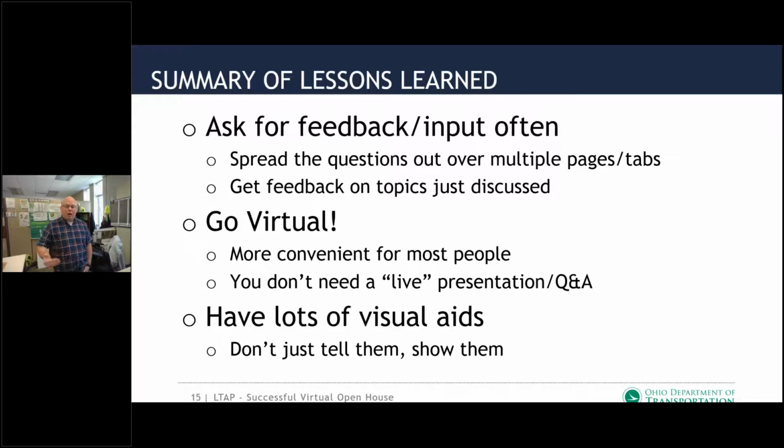With going virtual, you don't have to go live. You don't have to have a live presentation. You don't have to have a live telephone or chat box answering questions on the spot. You can do what we just did, which is considered open house. It's a static website with text and images and asking questions. That is what I call a low effort PI, because when you're going live, it takes a lot of effort to conduct that. But when you're doing virtual and you're doing open house, you have time to refine that, and you can post it and tweak it as needed. So you don't have to go all out to do virtual.